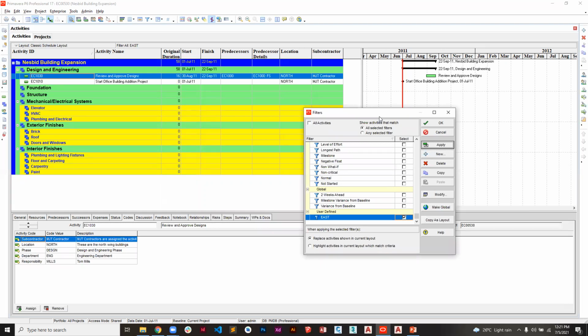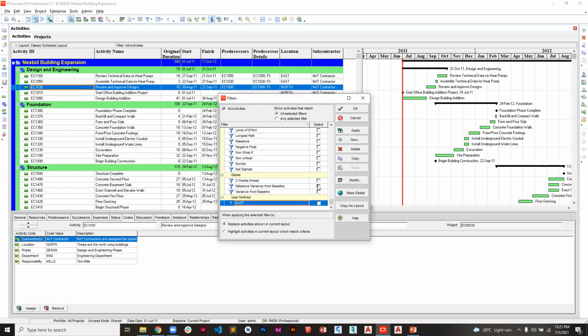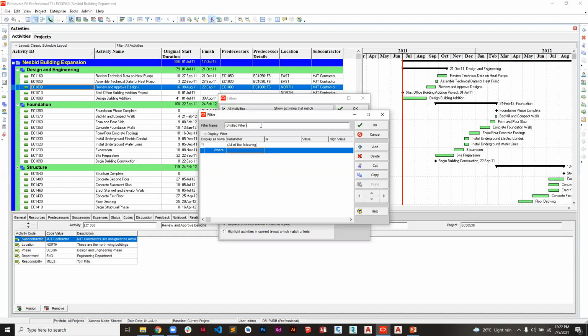For those ones that have not got it, you go to the filter. Now I'm going to uncheck this. We're going to create a filter that filters out the activities that are assigned to local contractor. So now that means we're using subcontractor is equal to local contractor. That is the filter that we want. So you come under filter, then you create a new filter. You can modify the existing ones, but it is better you create a new one because you may need these ones later on. So create a new filter. You call it a name. Maybe this is local construction